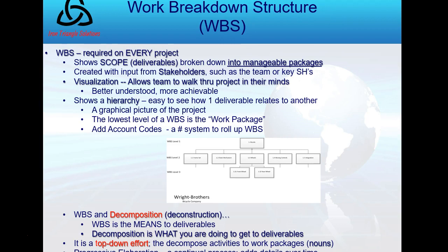Okay? So I'm showing the scope broken down into manageable pieces or packages. The very lowest level is always called the work package. And it's a visual way of seeing the project and helping people understand their roles and responsibilities and the deliverables that are required. Like I mentioned, it's shown as a hierarchy, and I build it by decomposing. So in the very top box, you might even consider the scope statement that I just finished in the define scope process. So I have the scope statement and I decompose it.